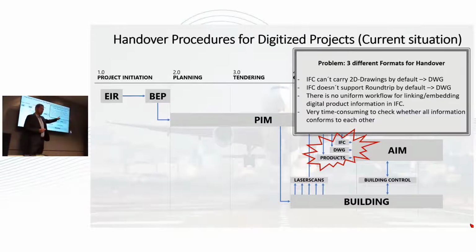During that time, you need to start operation, and you lost control over your construction company, because they have to get paid because they finalized the building. You have some fee left to pay them for the documentation, but this is not much, so they are not so much motivated to support you on that anymore. So this is the problem actually.